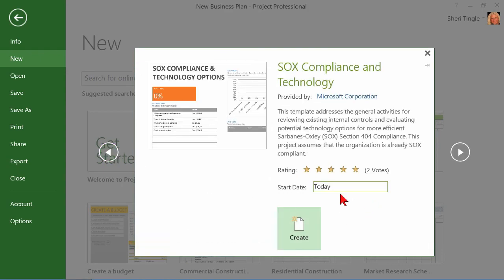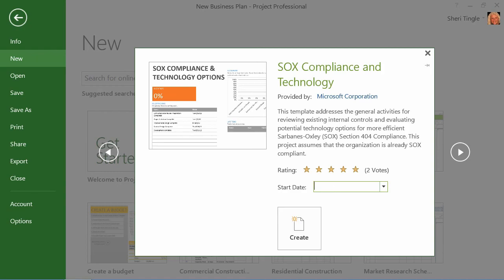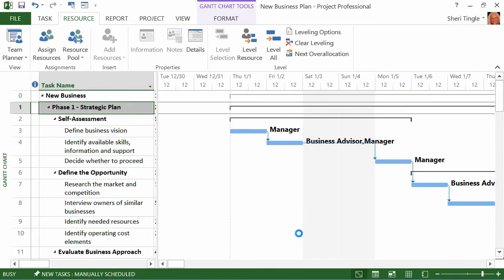And then you'll need to determine what the start date is of the project. So we're not going to start this project until, let's get rid of that date. It always puts up today's date as based in your calendar. And by the way, you can click this drop down arrow or you can simply type. So I want to start on January 1st, 2015. That's my start date. And then you simply click Create.